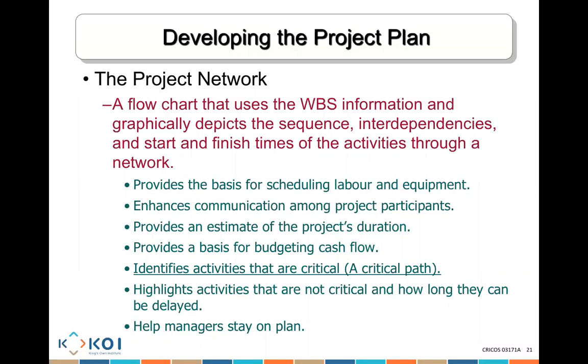You can know which activities are on the critical path. When I say an activity is on the critical path, it means this activity cannot be delayed, because if I delay it, it will delay the overall duration of my project. So any activity on a critical path that gets delayed will affect my ability to get the job done.